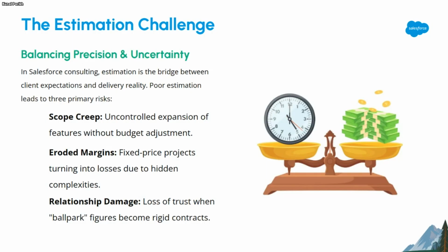The fixed price project might just go on and on, and you may spend your resources, your efforts, your pricing on it, but you are not going to get paid for it, because for the customer you've given a fixed price. So that also becomes an important step in terms of balancing, as well as